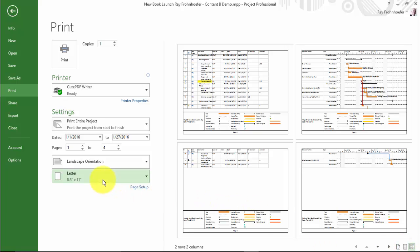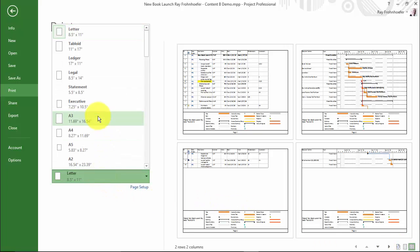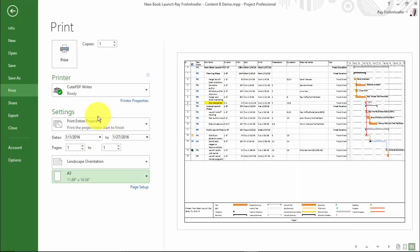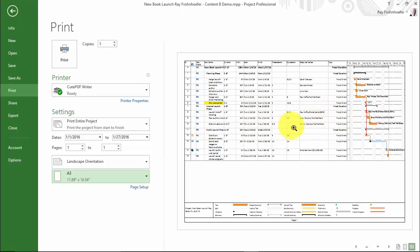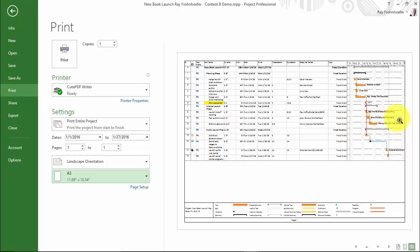Now, if I choose a different paper size, such as A3, I don't have a physical A3 printer, but I can create a PDF of that size. You'll notice that the entire project fits in here. Not only do I have the entire entry table, but the time scale of the project has changed so that I can see the entire project.